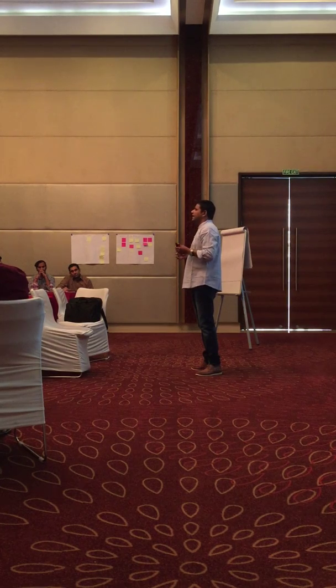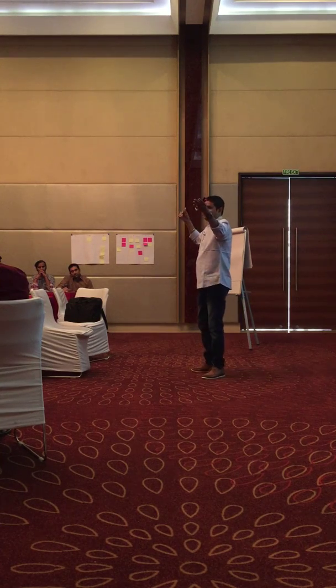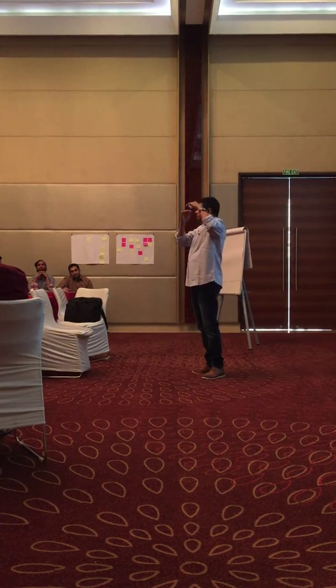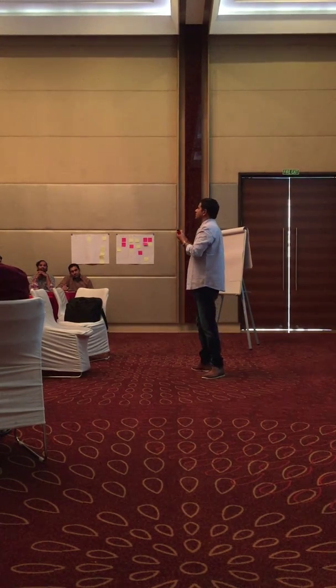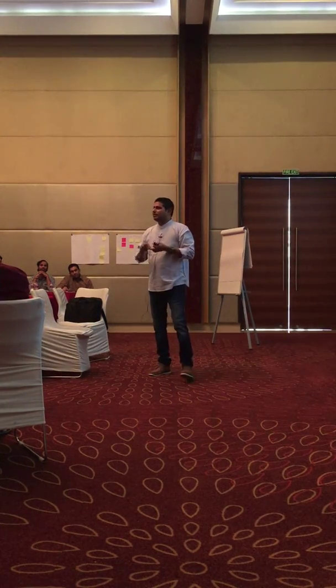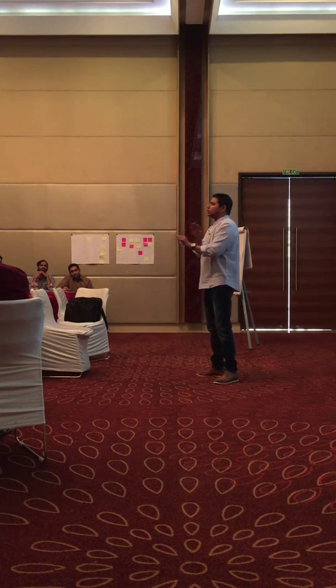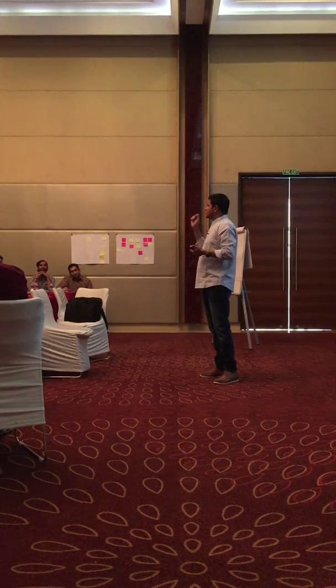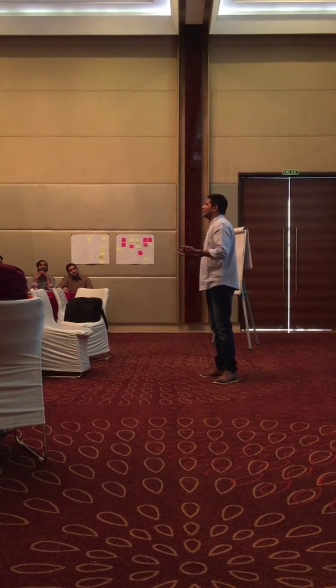Similar. And there's a gate, an entry gate and an exit gate. Your entry gate to the sprint is the definition of ready. Whether the item is meeting the definition of ready, you can create your own structure or criteria for this. For example, the story should be small enough, feasible in one sprint, has the acceptance criteria, testable, all these things. When it is not meeting, you say no, we cannot take it. Why? You may not be delivering that, isn't it? So at the end of the sprint, what should be coming out as output? A potentially shippable product increment. So if you are not clear, obviously taking them into a sprint is a waste of time and waste of money. Right?